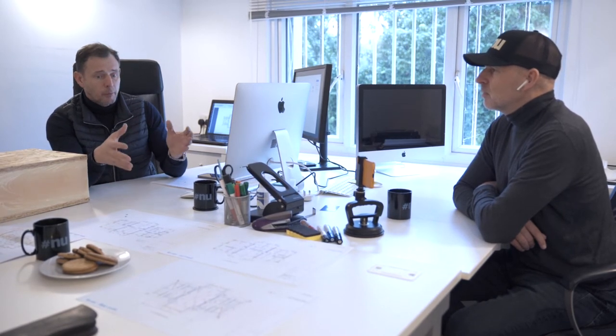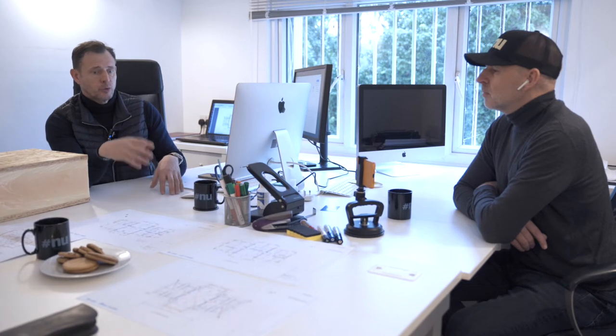But when you're doing things like that, you've got to design where the windows are going to go, and where the penetrations are going to go through the building for your services. These are the important parts that you've got to design out straight away. All building work, all construction work and all design, architecture then, should all be done at pre-construction. And then everything else should be easy after that.